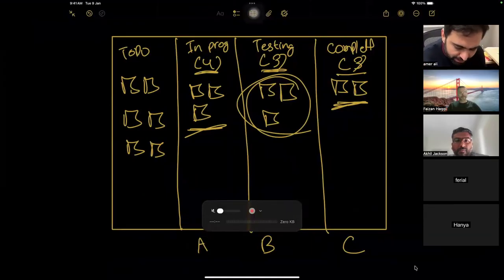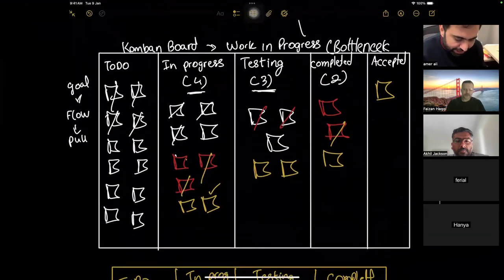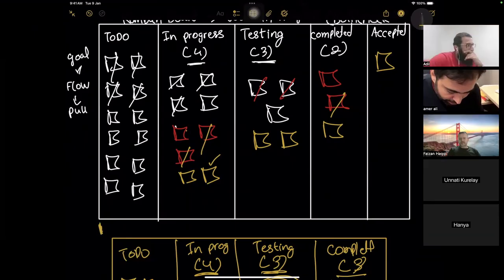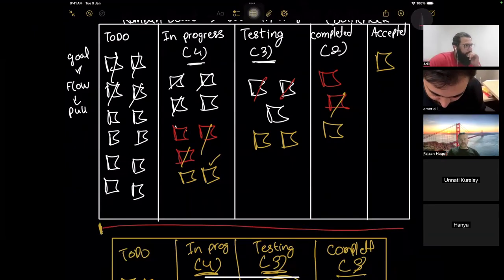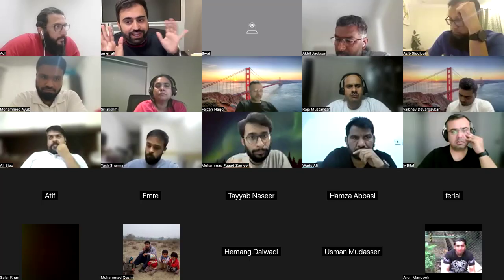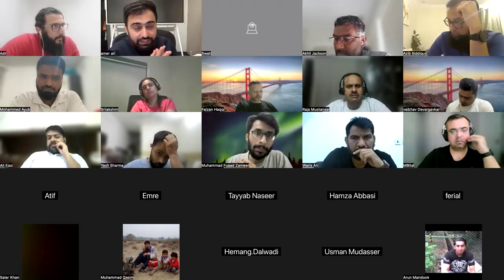Acha, one more thing in the information radiator, a term you may see, not in the exam, but in general. The time the user story was requested to the time the user story gets completed, the entire journey, is called lead time. The time the user story came to us and the time it ends is called lead time.